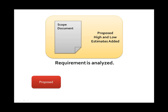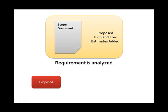Once a customer has entered a requirement, Notion is responsible for doing the requirements analysis. A scope document is usually produced and low and high estimates are required. Once the customer has evaluated this information, the customer is able to confirm a requirement for project planning.